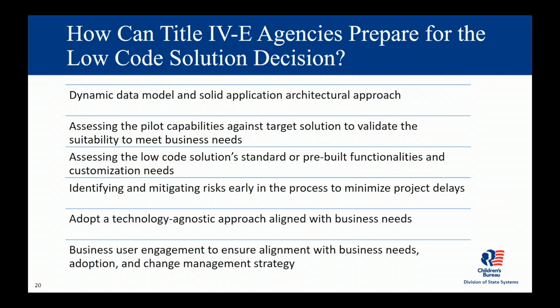Testing the solution with a pilot is also another good approach. That will help you know how well the solution aligns with your needs before a full-scale implementation. And also look at the pre-built functionalities within the low-code platform to determine what customization you will need. This helps agencies understand how it can complement your current business workflows.